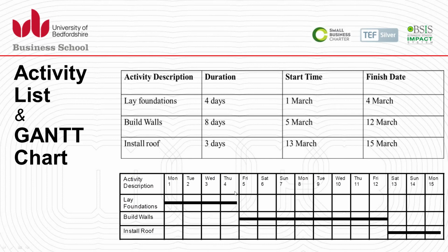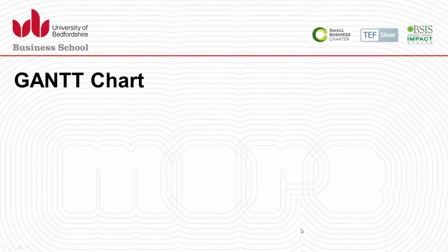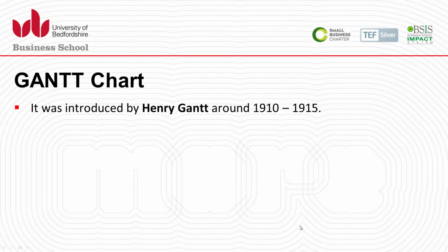However, there are different deliverables or parts of the project activities that can be done side by side. For example, when the roof is done, we do the further activities in the interior of the construction. So maybe plumbing, electricity, drain, they can be done at the same time, or flooring can be done along with the plaster work. So we are looking at the Gantt chart.